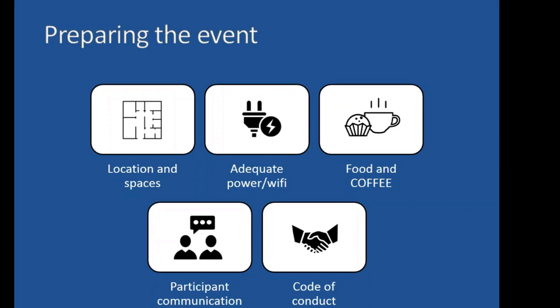Another thing to consider is how participants are going to communicate with each other before, during, and after the hackathon. I've done a little bit of research on hackathons, and looked at the characteristics of teams that work out well and actually come up with a final product. A lot of these teams had communication before the hackathon starts. Most of that has been in the form of a Slack channel, which is a free project management chat source that you can get.